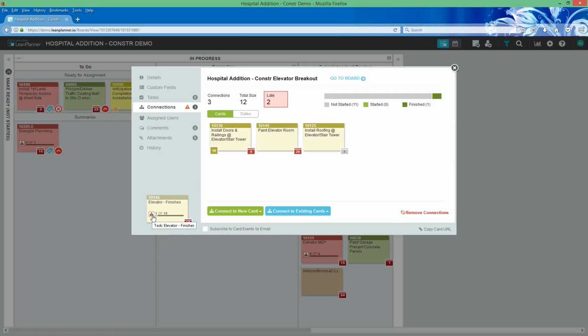To go and say, oh, maybe something changed. Maybe material didn't show up on site, or somebody got sick and we had to rearrange a couple things. And it's not like a CPM type scheduling tool, where you make one change and it just waterfall cascades, bumping the rest of the project out by a month or whatever it winds up being. Rather than doing that prescriptively, this is much more meant to give you the ability to look and say, aha, this happened. Life happens. Something didn't go according to plan. We can see what that is, all of us as a team.